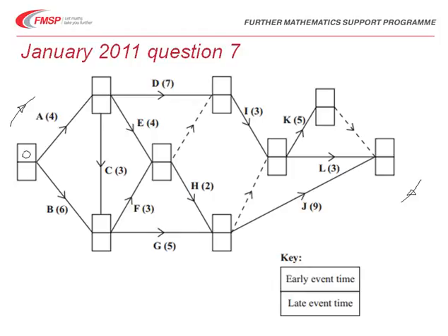Starting off with A, there's only one way of getting there, so that's going to be 4. But if we look at the event down at the bottom here, B would give us 6. However, we need the longest time required, so going A and then C gives us a value of 7 at that point. Again, continuing forward, if we look at this next one, going from the 4 at the top using E would give us 8, but then from the 7 at the bottom point plus the 3 gives us a value of 10.